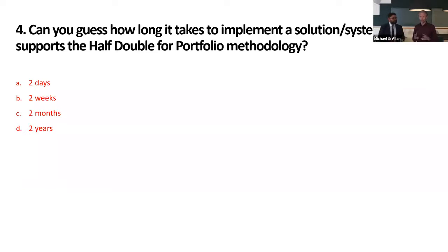It does. And I just want to share one very interesting data point related to when the portfolio committee started working with this setup. Even though we had the system, even though we had been debating this for quite a while, of course, on our first prioritization meeting, we put too many projects into the pipeline. So it is, again, not an easy way to approach it. But then we talked about the idea of having a limited number of projects, because this is what we're capable of doing. So what will happen to the 2 projects that we just put in? And everyone crossed their fingers and hoped for the best.